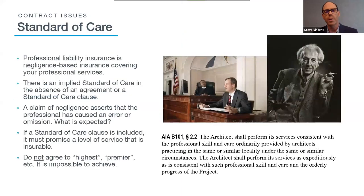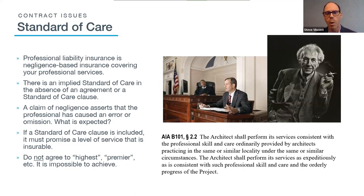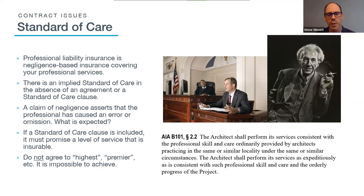One of the biggest issues is standard of care. In essence it's what is expected of you as a professional architect. What would an architect do on a hospital project in Boston? On a neonatal intensive care unit — what would be expected? In a courtroom with an expert witness, they would say: here's what is expected of that architect. Would you expect drains on a flat roof? Yes. So you're held to that. This establishes the standard of care in the absence of a contract.